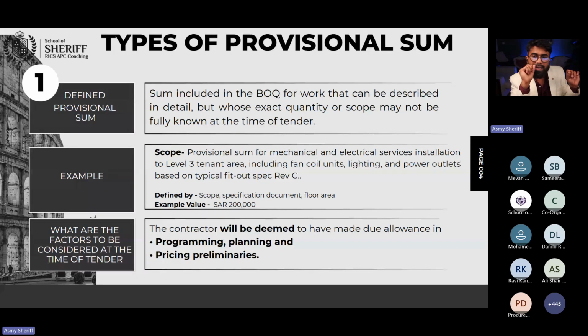Scaffolding money, rental. Under what item? Maybe plastering, construction, other things. Under what? You don't know, right? You need scaffolding, but you can't very specifically claim the scaffolding-related rental from the employer under one item. Those general items, we call preliminaries.